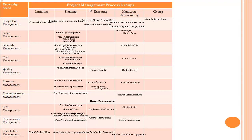Under process group executing, processes are: direct and manage project work, manage project knowledge; under quality — manage quality; under resource — acquire resources, develop team, manage team; under communication management — manage communications; under risk management — implement risk response; under procurement — conduct procurement; and under stakeholder management — manage stakeholder engagement.